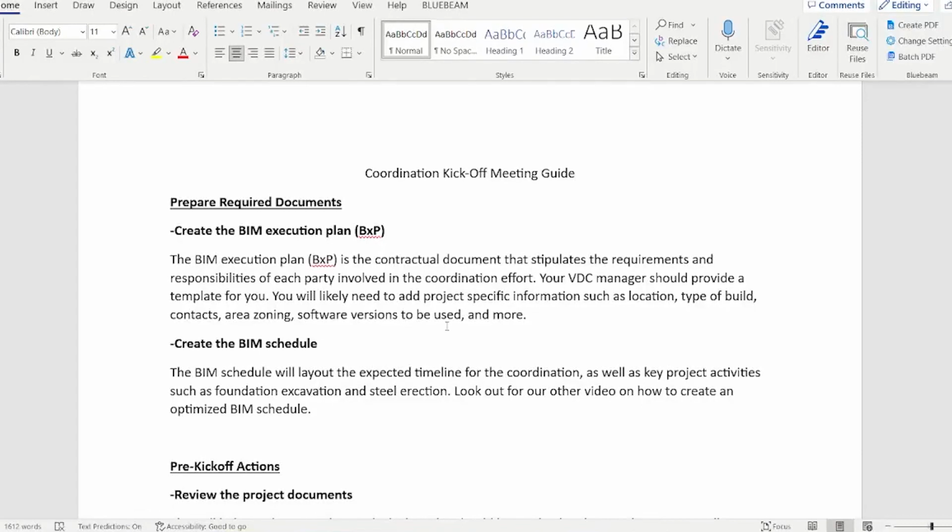After you create the BIM execution plan, you're going to want to create the BIM schedule. The BIM schedule will lay out the expected timeline for the coordination, as well as key project activities such as foundation, excavation, and steel erection. There could be other milestones in there too, but typically these are the main ones. I'll do another video in the future on how to create a BIM schedule.